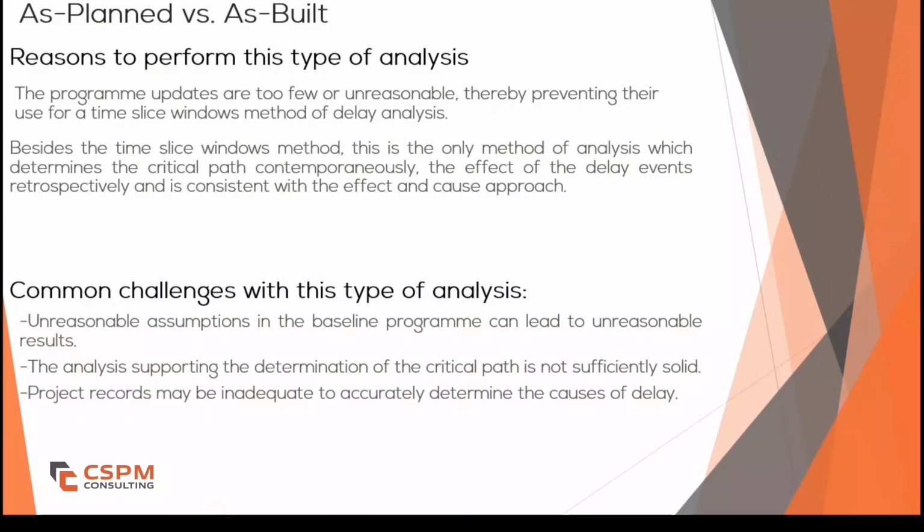First, when regular schedule updates are missing or unreliable. For delay analysis methods like Windows analysis or time impact analysis, we typically rely on consistent and reliable schedule updates throughout the project. However, in some cases, the project schedule may not be updated frequently.